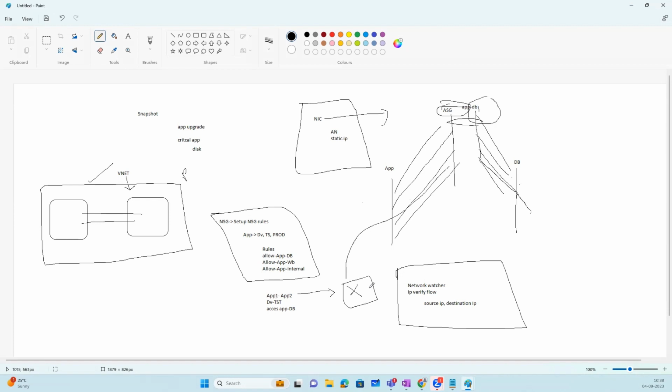If it is expected to be allowed, then go ahead and create a change request. If it is production, you are making a change in the production environment, and maybe while doing this change you might make a mistake. It's important to track changes, which is why we create a change request. For test and development environments, you may not need it. But if you think it is not recommended to allow, then that's when you go and do your analysis.